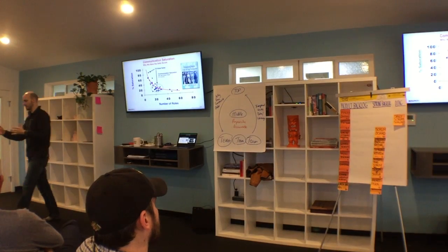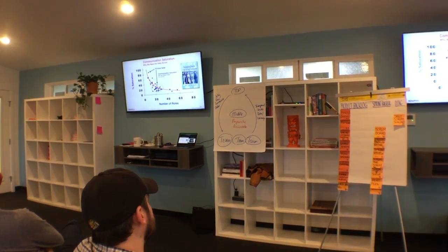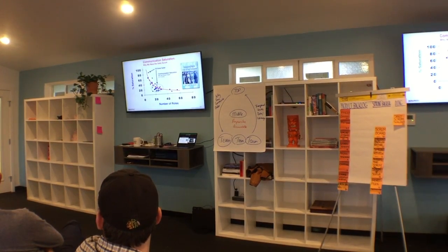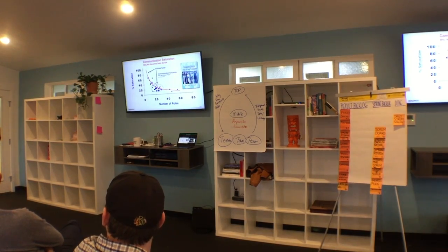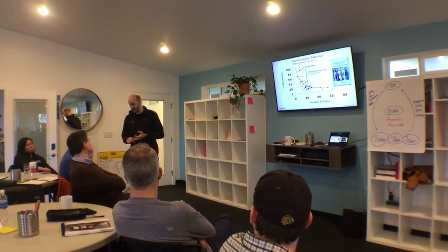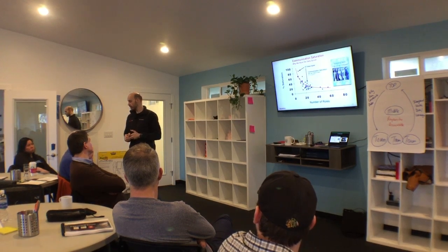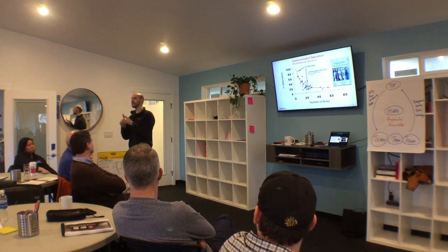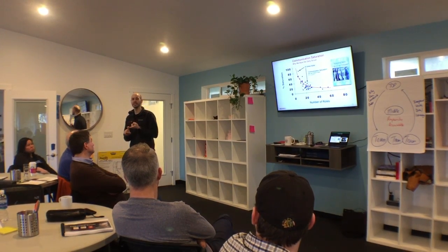If we walked up to this team and I asked, may I interview the members of this team independently in separate rooms, and the team says yes. And if I were to ask you in a separate room from the team, what's the team's top priority goal? What's the team's plan to get it done? And in what architectural constraints does the team have to deliver it? And then let's say I asked Rosemary in a separate room the same question. The percent similarity of their answers is called communication saturation. And it's directly linked to how quickly the team delivers.